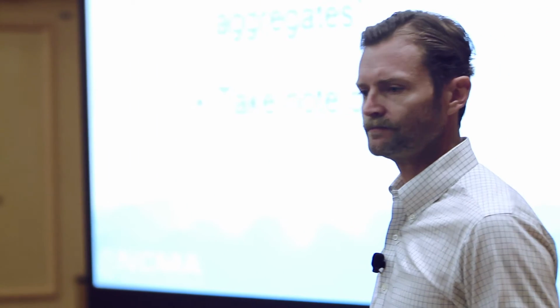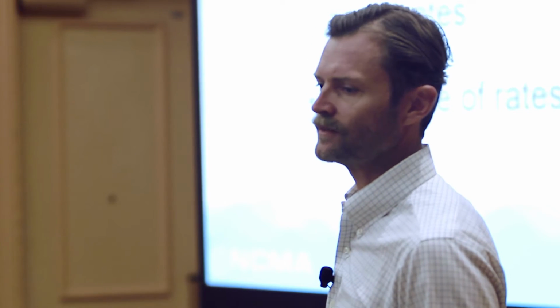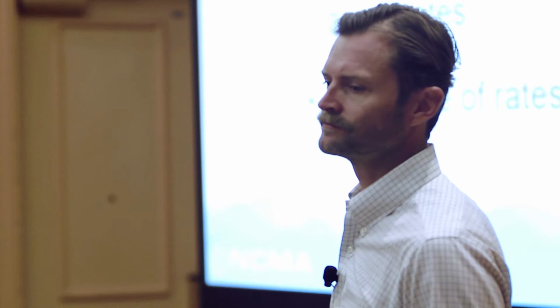Yeah, that 10% is relative. Okay. It's relative to the cost of the overall proposal. True. All of your other line items are a total of 90%, and you've got this one little factor, like your $1,500, you may not care. Right. But is it relative? Is it reasonable to have that cost in your proposal? Right. If it's reasonable and it's a large sum of dollars, even though it's only 2%, then you're going to worry about it. If the rest of your proposal's $2 million and you've got a little cost over here, you may not worry about it.